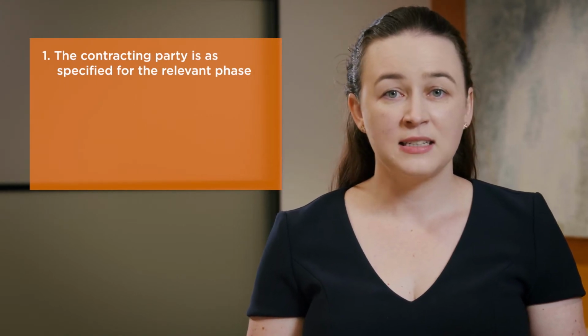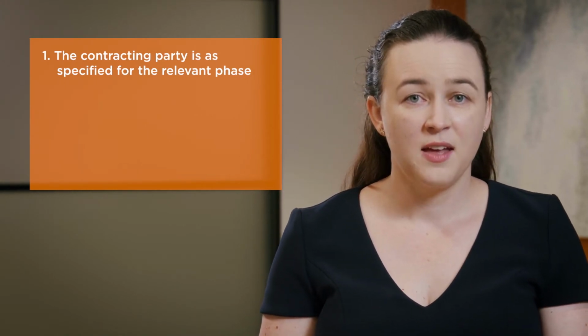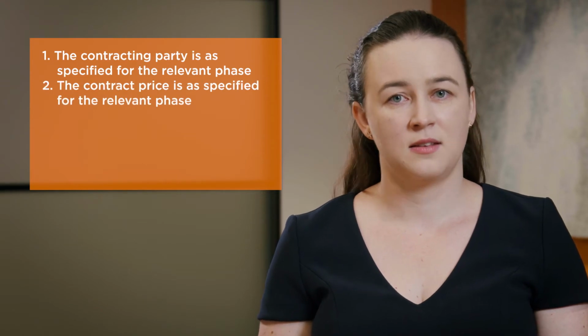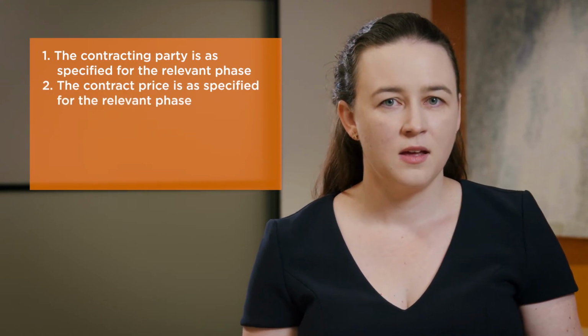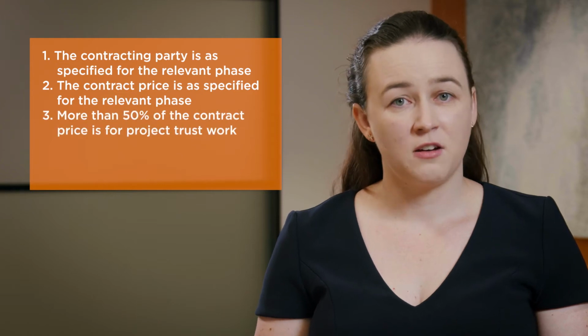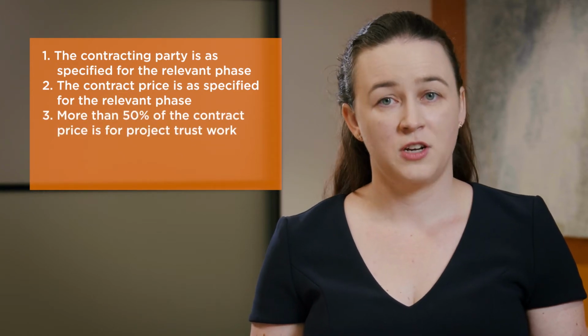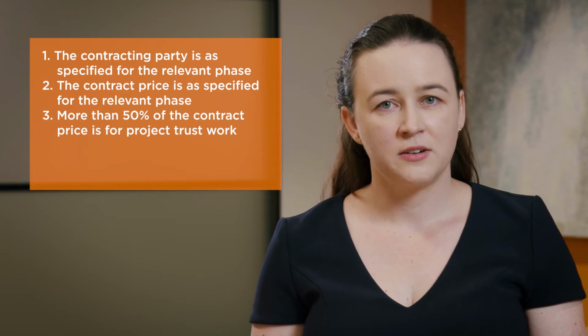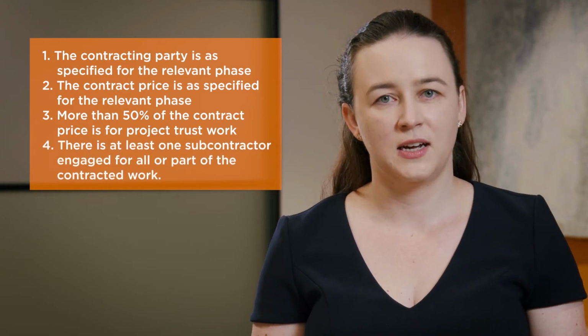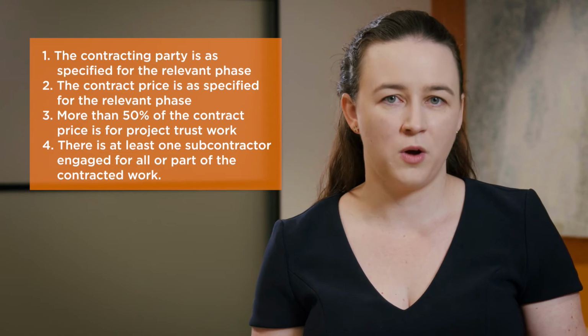So do you need a project trust account? There are 4 criteria that each contract needs to be assessed against to determine if a project trust account is required, and all 4 criteria need to be met. The first criteria is that the contracting party is as specified for the relevant phase, and the second is the contract price is as specified for the relevant phase. We then get to more than 50% of the contract price needs to be for project trust work, and the last criteria is that there's at least one subcontractor engaged for all or part of the contracted work.